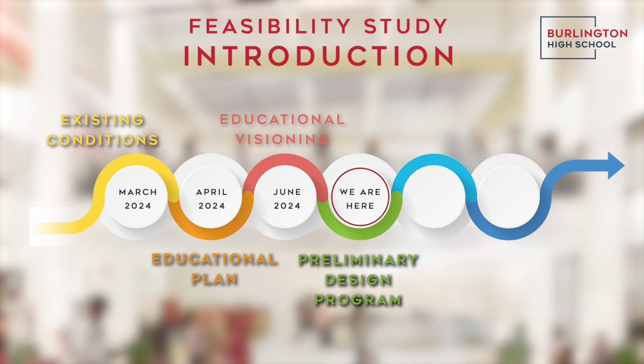This is the current status of the Burlington High School feasibility study. This report provides a wide overview of all viable options, including renovation only, addition renovation, and new construction. It informs the SBC and district leadership of what's possible so as to work toward the best solution for Burlington. The next phase of the project is the preferred schematic report. This phase analyzes a short list of each type of option and concludes with a single recommended path forward for the high school.